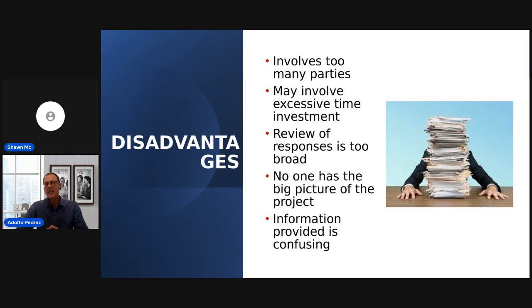Now, sometimes it's very difficult to have someone representing each of these departments to join all the calls, all the meetings, all the demos, the reviewing of the information, and all the tasks involved with the RFP. And that requires a lot of coordination, and sometimes that is not really that easy because it is not a one-week process. It can be a lengthy process of even 2 months or even longer.